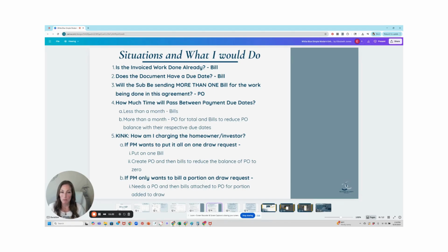But I do not want to hyperinflate my accounts payable and make it look like we owe other people more money than we do. And we don't owe them until the material is delivered. So that's how I would handle that one.